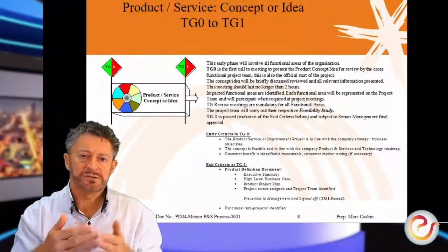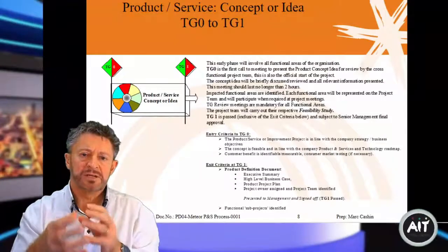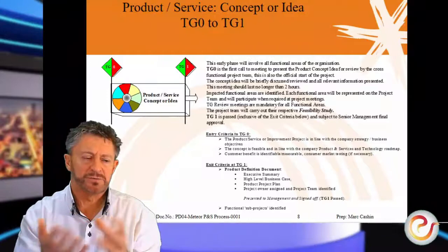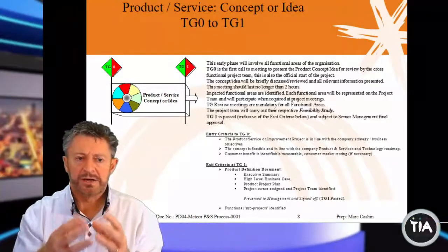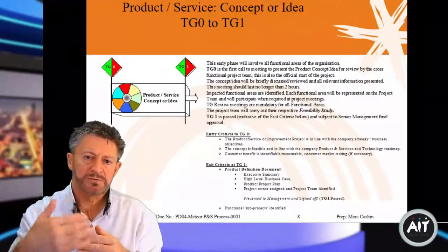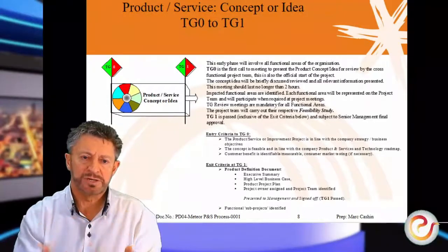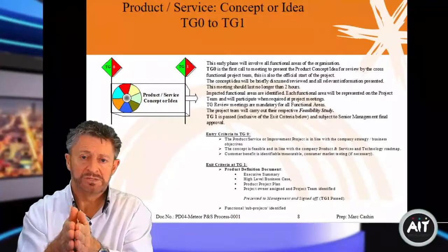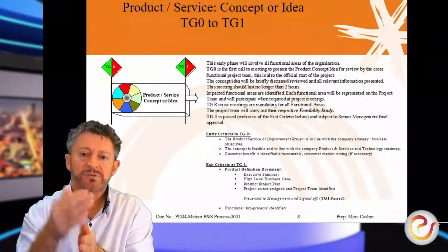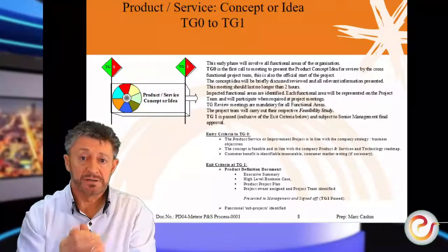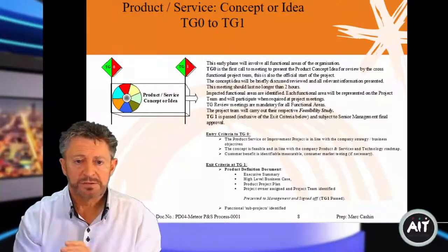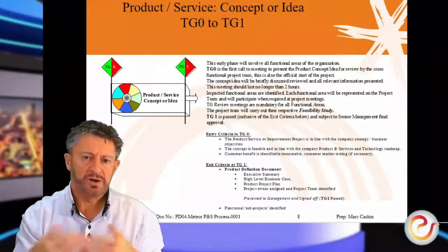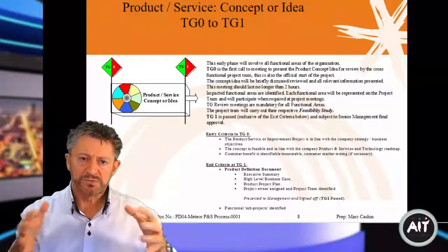Sales and marketing would say, well, we need to start on week 5. We need to get to know what the product is, what it'll look like, how it, or the service, whatever the case may be, what it looks like, how the customer will have to use it. So we need to be able to communicate to the customer. So they'd have to put their communications project and their plans in place such that on week 11, when we said we'd have it ready, marketing are ready to launch and release everything literally at the push of a button. So pushing stuff out on our website, putting ads in on TV and radio, and so on and so on and so on. So all of this was well orchestrated.